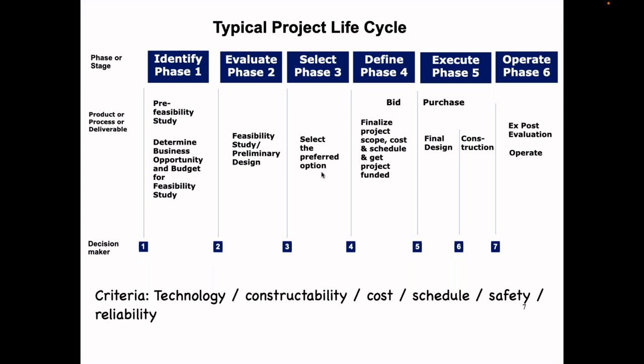Owners have different ways of developing scope, depending on the industry and the value of the work. All projects go through a project life cycle — as you go through it, you are developing scope in more detail and looking at the risk. Some owners are loosely goosey with scope development and combine life cycle phases, sorting out problems in the field. Others believe in project management concepts but abandon them when development costs rise. Then there are those deeply committed to the project management process.